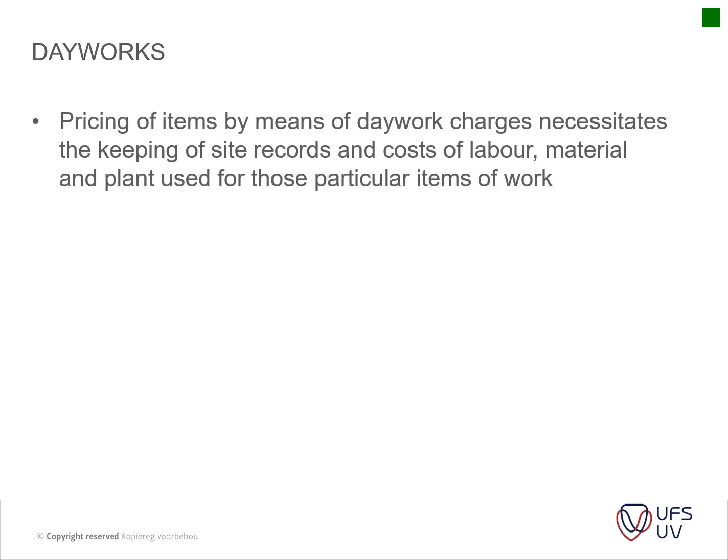Okay, day works. Day works is basically pricing of items by means of day work charges. It necessitates the keeping of site records and cost of labor, material and plant used for those particular items. So day works is basically labor rates that you've got in your bill of quantities. The civil engineers like to use that, and that is usually where you have a tariff for instance, a